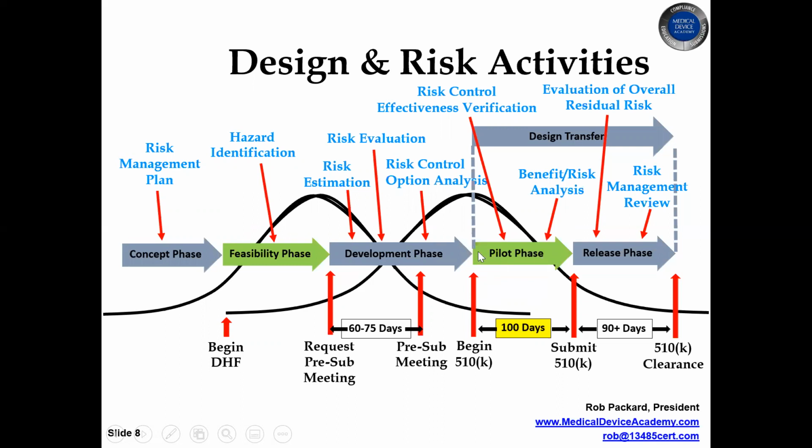So that means you still have to do all your verification tests. You have to do all your validation tests. You have to get regulatory approval. You have to validate the production process. So you might have made prototypes, but you don't have a production process yet. So you've got to take it from prototype to commercial scale. That requires some process validation. You might get it approved in one country, but you don't have it approved in the other countries. So this whole process could take years, depending on how complex it is and what the regulatory hurdles are.